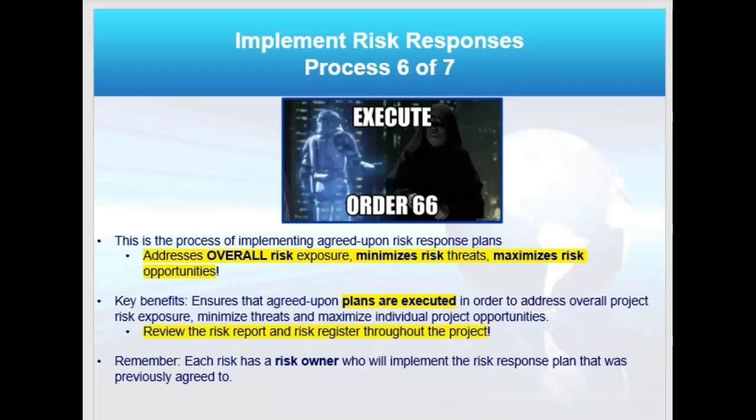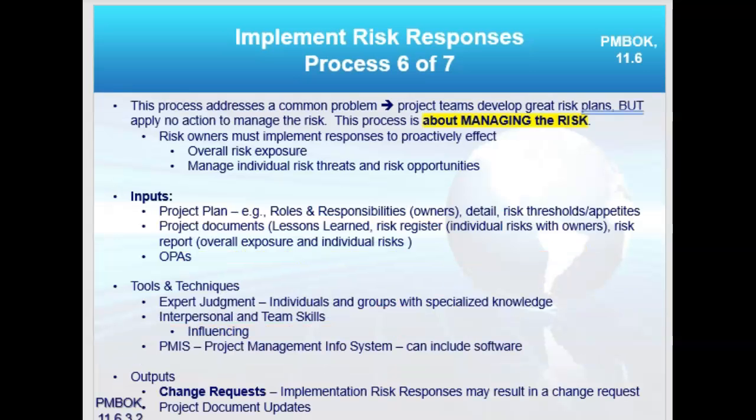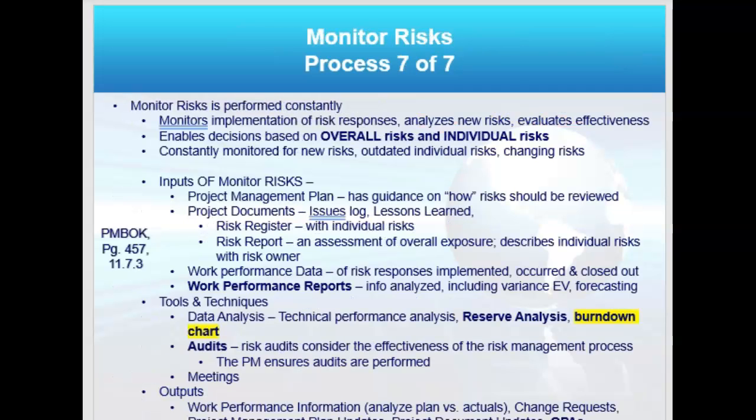Okay, so implement the responses. Look for the triggers. Talk to your risk owners that have accepted responsibility. So it comes with its own inputs, tools, techniques, and outputs as a way of managing the risk, of monitoring the events that unfold. You can find more on this in the PMBOK Guide 11.6.3.2, right? And it's natural, again, that your outputs would be change requests, right? Because as we implement responses, we will learn new things that may have to be updated.